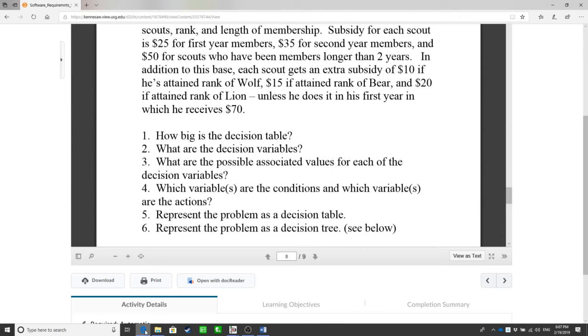Because the first node is actually a dummy node. So it's not an actual process in this whole software development process. It's not an actual activity there. It's just like saying, okay, we start doing this.